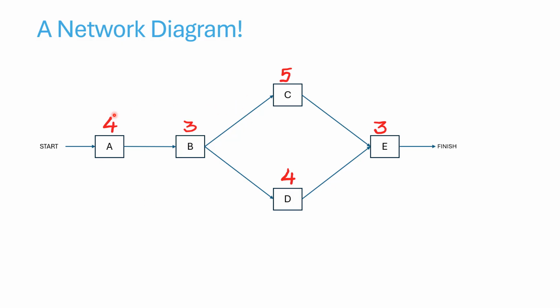This network diagram always has a start point and a finish point. It's mandatory. And our goal is to go from the starting point to the finishing point along these paths. C and D are parallel paths. It is possible for both to be under execution at the same point of time. One more point that is important to note is that you should never go in a loop. Loops are prohibited in a network diagram. So don't do something like A, B, C, E, and D. That won't happen. Okay. So next we will see how to calculate and identify a critical path.